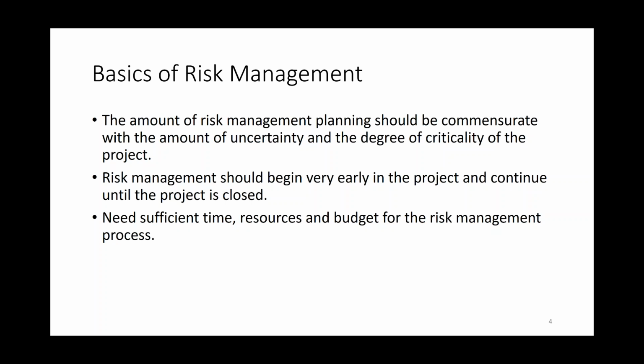And when you start this, it's very early in the project. When you're developing a charter, you're already looking to see what the areas of risk are, what areas of uncertainty are going to hit your project that you need to think about. You need to plan early for risk management. Planning early means I'm putting time in to deal with risk management on a consistent basis, whether it's monthly or weekly or every quarter or phase I'm going to reevaluate. I'm making sure I've got the time